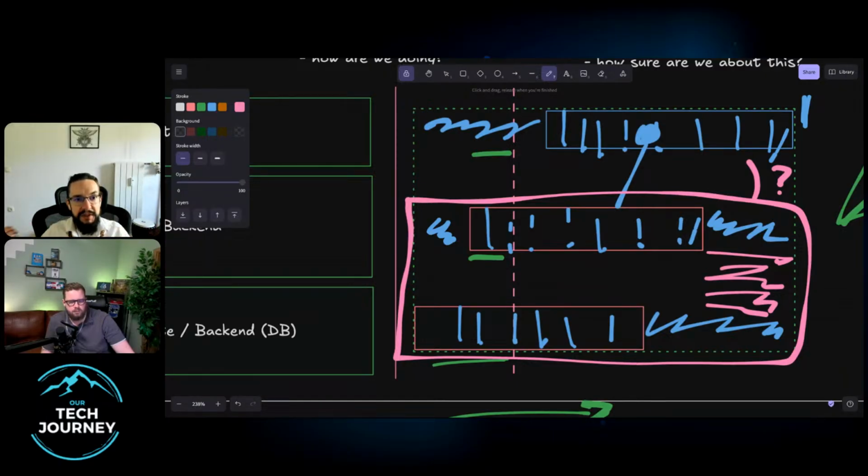And when the team splits up, somebody needs to manage it. It's scatter-gather. When the team scatters, somebody needs to step in and manage the gather phase, which means that somebody is always interrupting. Something needs to be interrupted for the gather phase to happen, which creates a lot of tension, which creates a lot of, no, I'm in focus mode. Yes, but you're in focus mode on the wrong thing. It's time to gather. We scattered and now we gather.